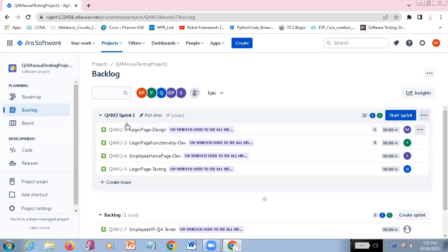Okay, so we have added all these user stories in this particular sprint, and initially they are going to specify some set of story points. If the story points are not enough, or it will not take that much time, you can just ask your project manager to change the story points which have been allotted. We have to tell them once it's started or before starting? Before starting, see, before the sprint gets started itself.